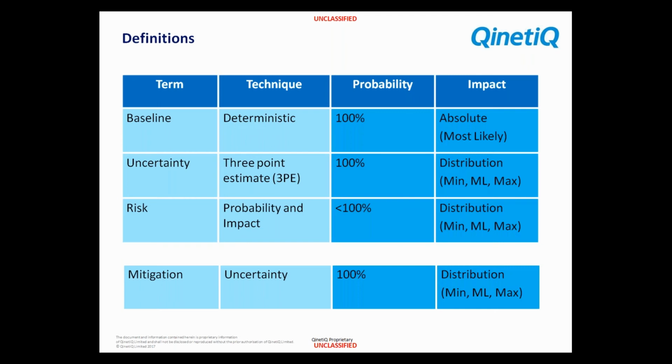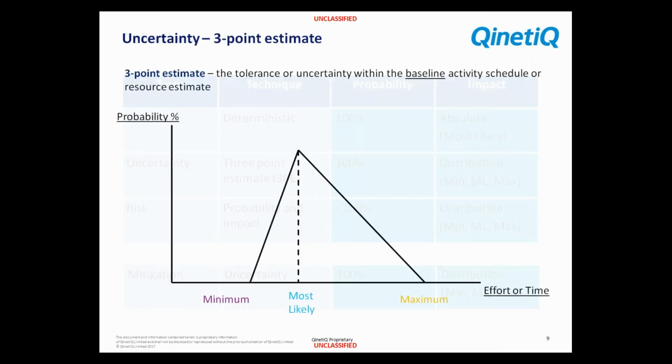But the trick here is recognizing that a mitigation is 100% probable and it has an impact. And we can only reduce the risks once we've funded or considered the mitigation actions. So we'll consider both risks which are before mitigation and risks that are residual after mitigation, and use it in that context. Okay, enough of this.